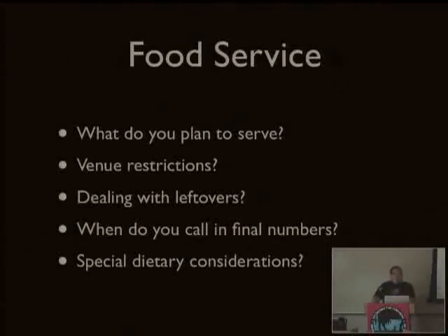If you're dealing with a professional conference venue that has their own food service, or if you're dealing with a large college campus that has a food service, most likely those venues are going to have exclusive contracts, and you're going to be required to use their food service. So if you want to say, hey, we'd like to order in pizza for everybody on one of our days, they're probably going to tell you no, because they're under contract with their food service that nobody else is going to bring food into their venue. So you need to discuss that with your venue early and see what they will allow you to do.